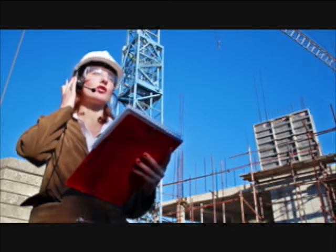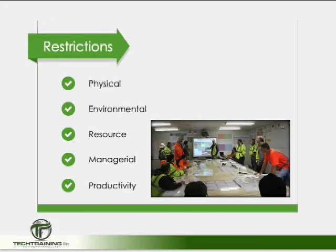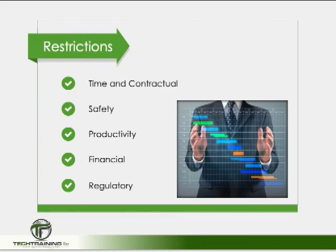The duration of a construction project is contractually constrained by the specified time in the contract documents. Consider some of these constraints: physical — such as a small site with no lay-down or storage space; environmental — working near wetlands or other protected areas; resource restrictions such as cash or labor; managerial restrictions — supervisors can only be in so many places at once; and productivity — consider productivity rates on a beautiful April day compared to a miserable mid-January day. These constraints may lead to time, contractual, safety, productivity, financial, and regulatory restrictions.